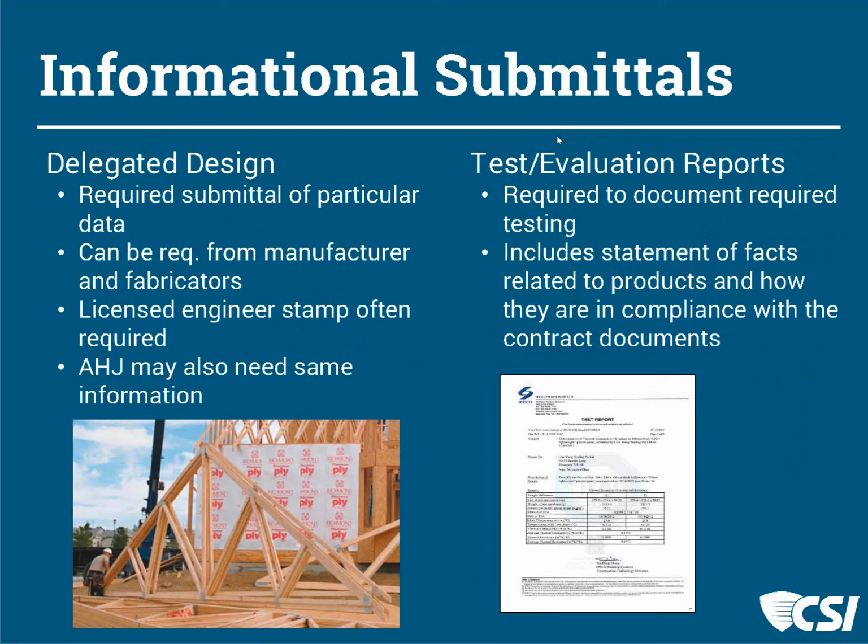And then testing and evaluation reports, we want to see the same sort of recorded documentation that independent parties have been there and looked and verified that, yes, in fact, as related to the products, they're in compliance. It's been used in the way that it's supposed to be used. We're not going to take any action on that. We're being sure that the contractor has a watchful set of eyes besides ours over their shoulder to be sure that the products are being used in compliance with how they were tested. So that's another kind of informational submittal.